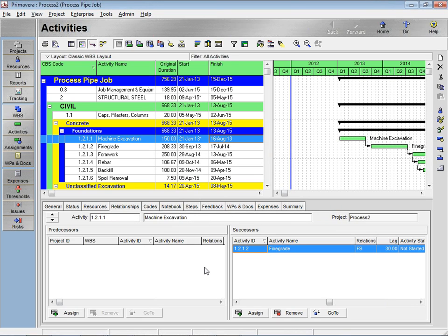Okay, so that gives us the ability to do those full circle evaluations, dealing with changes, looking at how changes to the scope affect the cost and the schedule, and then completing that circle back the other direction. How do those schedule durations affect the cost back in the estimate? This new finish date obviously is going to drive higher escalation costs back in the HardDollar estimate.